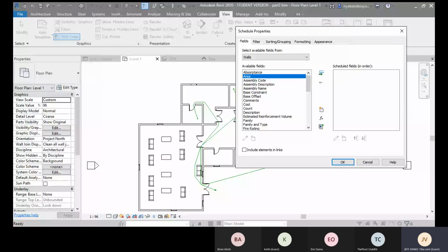So by area, let me explain a bit. By area, we want to look at each area of wall, and then we assign the cost of a unit, let's say a unit squared of that area.